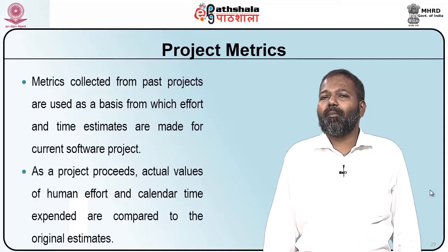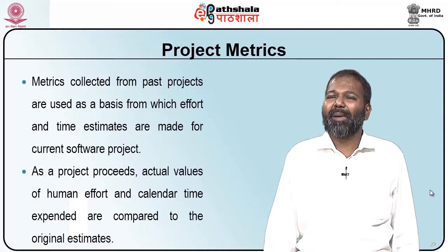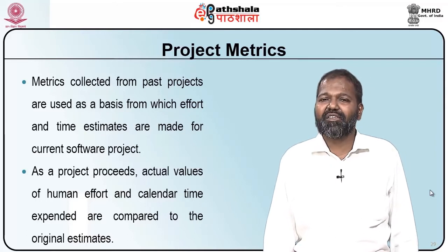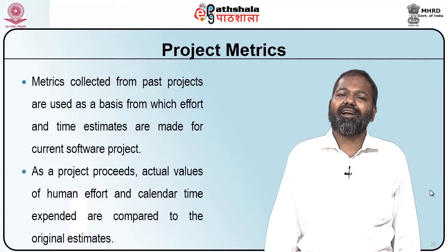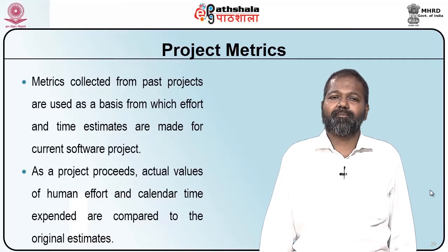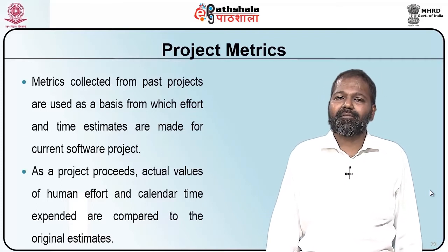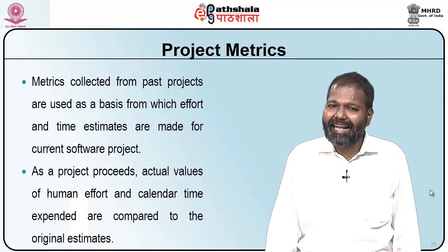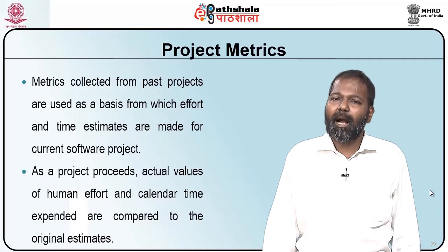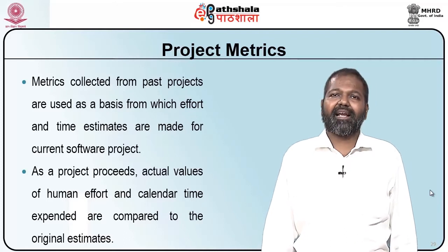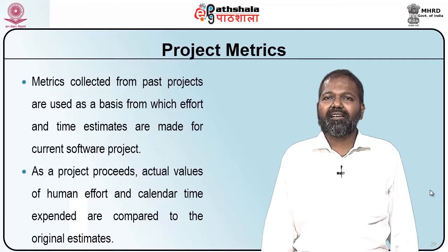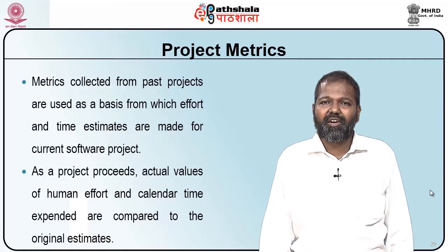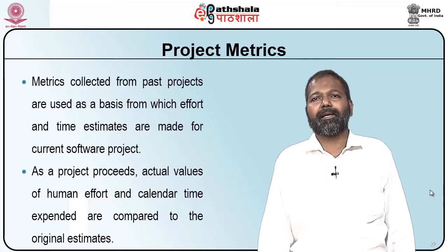Metrics collected from past projects are used as a basis from which effort and time estimates are made for the current software project. As the project proceeds, actual values of human effort and calendar time expended are compared to the original estimates. A comparison can be performed only if measurements are done periodically.